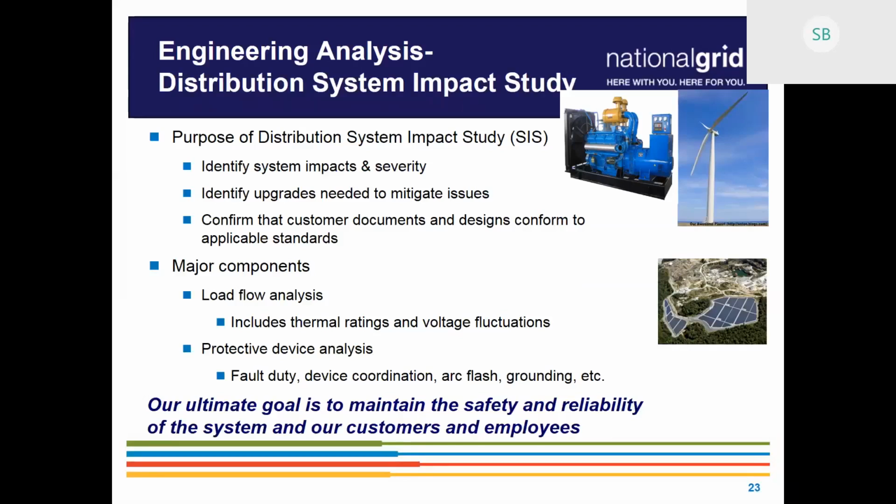So in your report, you're going to get a clear definition of what we analyzed, what we found as a result of that, and what the resulting system modification costs would be, to give you an informed decision on whether or not it's economically viable to move forward with your project. It also shows the overall impact from a system perspective for the area, so you know which areas are good, which are bad, which are more difficult, and some of the challenges that we're up against overall as the grid keeps expanding with all the DG.